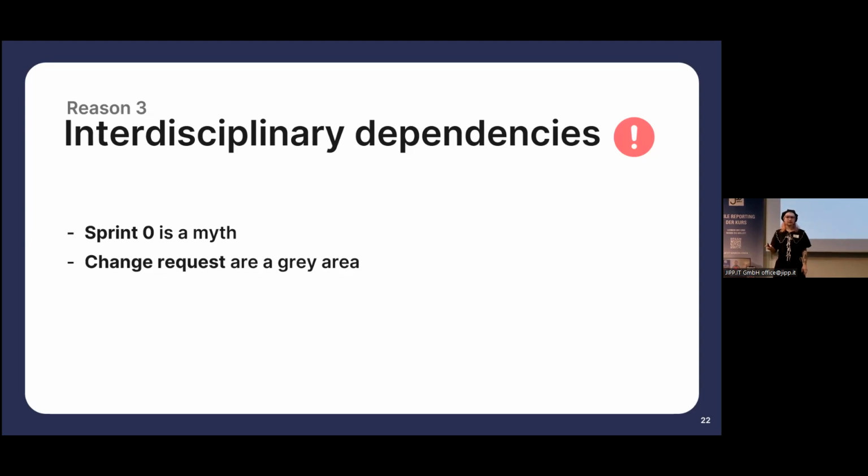Not really. It's just that the stakeholders, the client, didn't know at the time what they need and what it should look like. So they throw it back to you, and you have to work on it now. You need to create this now, because it's going to influence the rest of your design. You cannot take it as a change request, put it in the backlog and deal with it later. It's not possible, because design is dependent on each other.